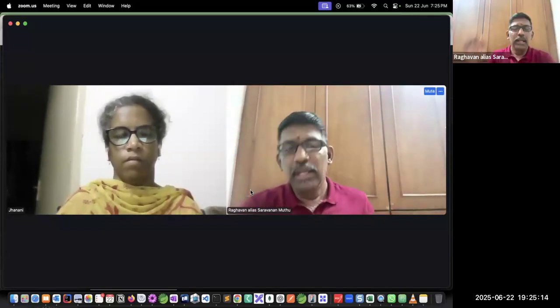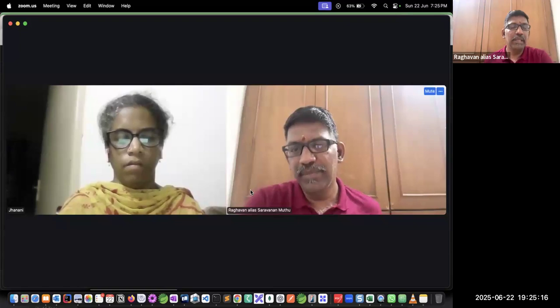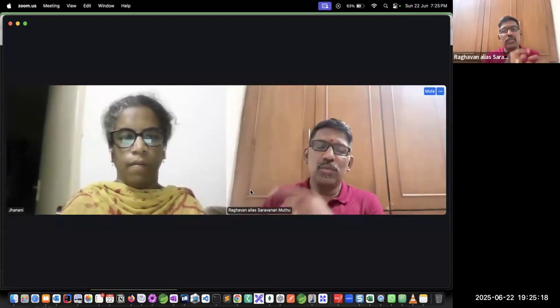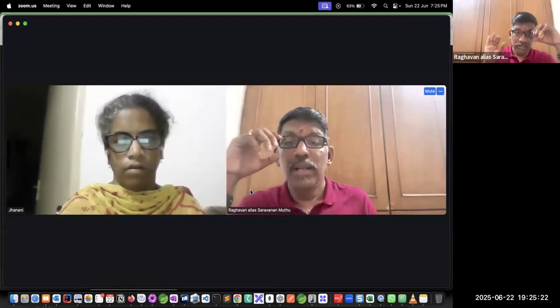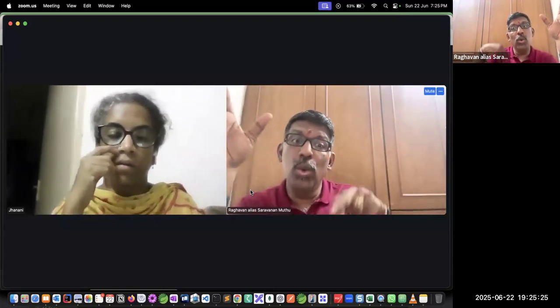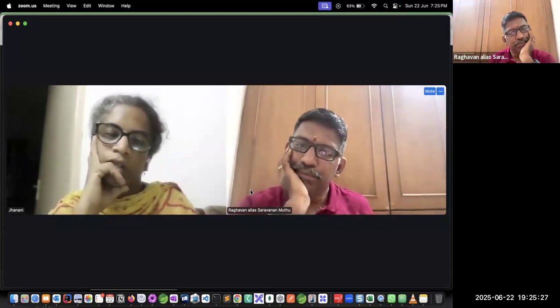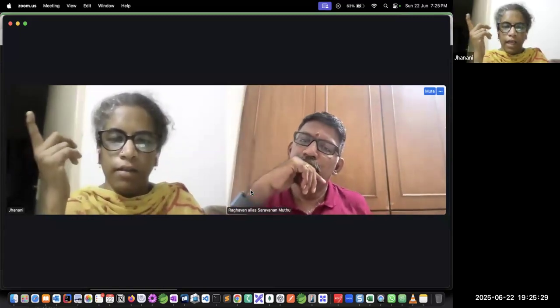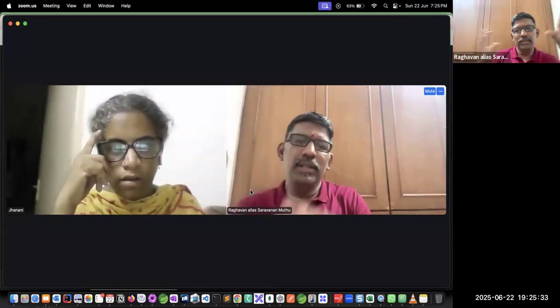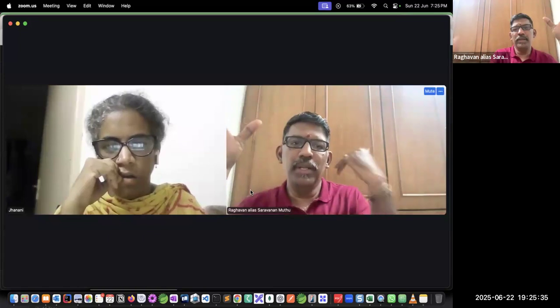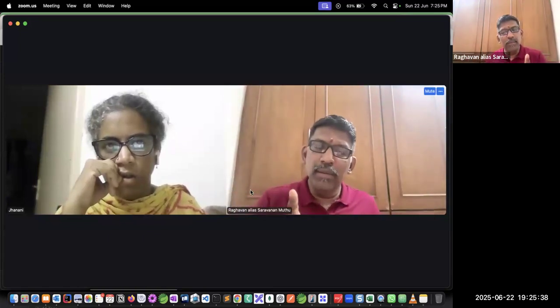Rest of others, let's have the Confluence page ready. Then the Jiras we have to create freshly under the next gen project. Either we move it or clone it, copy paste. If we clone it, we have to enter the comment in both the projects, right? Moving will move it.